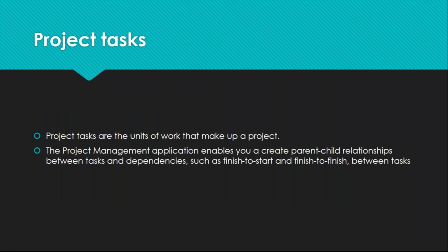Project tasks are the units of work that make up a project. The project management application enables you to create parent-child relationships between the tasks, and dependencies such as finish to start and finish to finish between the tasks. All this project task relation I can show you in the planning console.